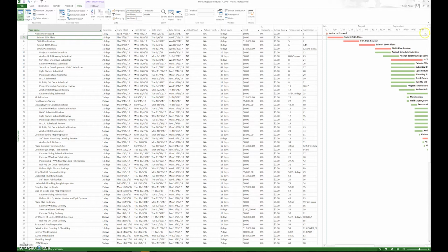However, I'm doing stuff that should be taking place in 9/24. As long as they're getting everything done in that week and they're getting stuff done ahead of time, that's okay. Many superintendents get confused by that. Just because it says that we should be only doing this stuff doesn't mean that doesn't give us opportunities to do more than that, so they can go into weeks down the road. We just need to make sure we focus and get everything done this week, or at least the things that are on the critical path.